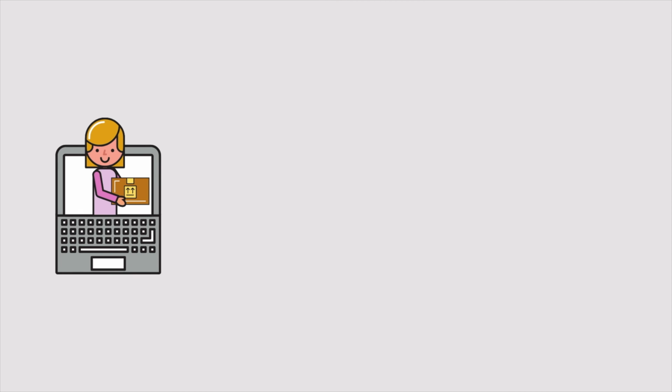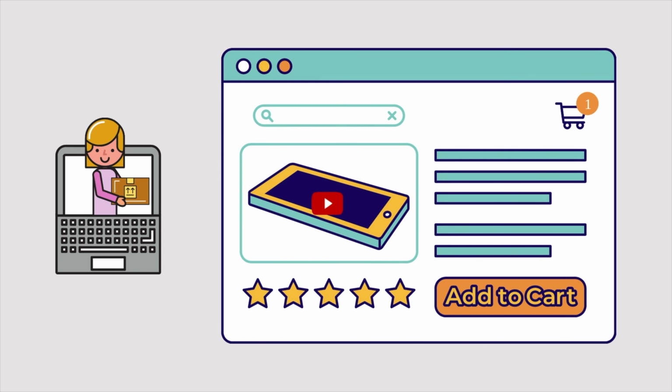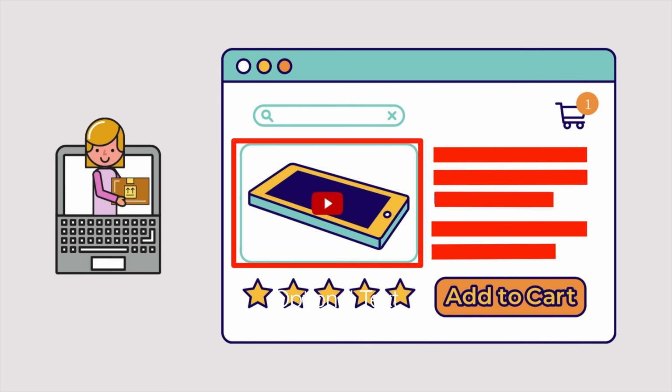To understand it with an example, let's imagine that you are an online seller. For each product that you sell, you have a product description page on your website. The product description page has a place for basic information about the product and the ability to embed product review videos from YouTube. The website stores all this data in a backend server. Now, creating a product description page is a large user story. While splitting this story, the team's first instinct may be to divide the story into 3 smaller stories along architectural layers of database, logic, and UI.